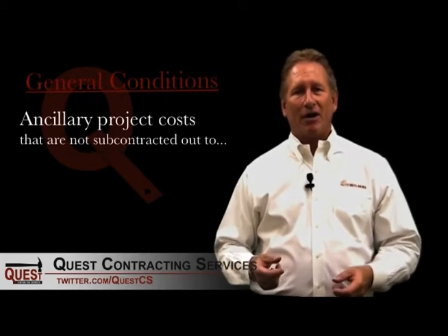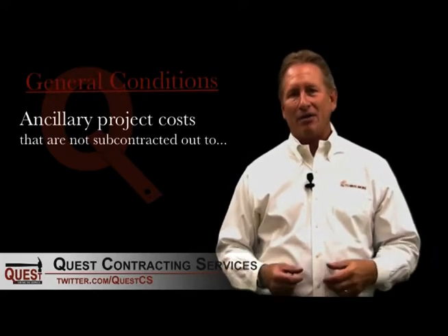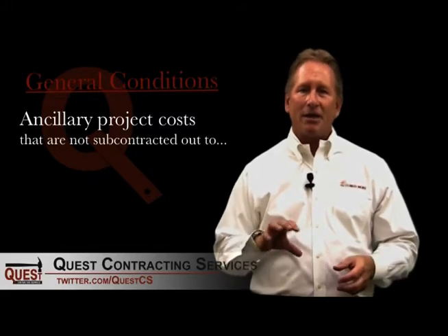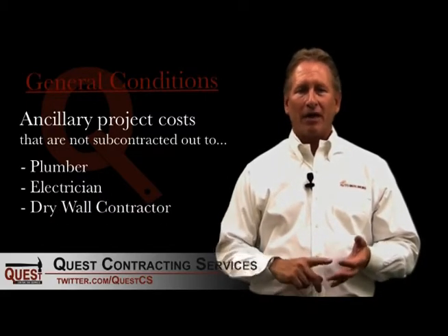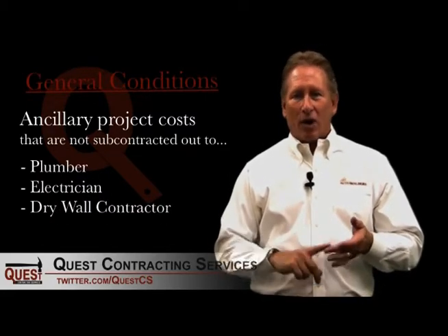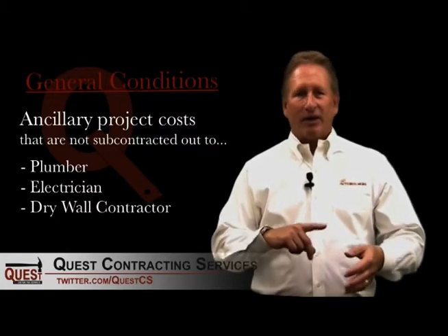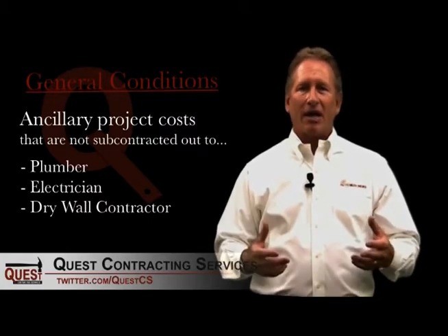General conditions typically are ancillary project costs that aren't typically subcontracted out to a subcontractor such as a plumber, an electrician, a drywall contractor, a ceiling contractor, a shell contractor. Those are all subcontractors that we hire and they do certain portions of the work, but there's certain portions of the work that need to be done that are included in our general conditions.